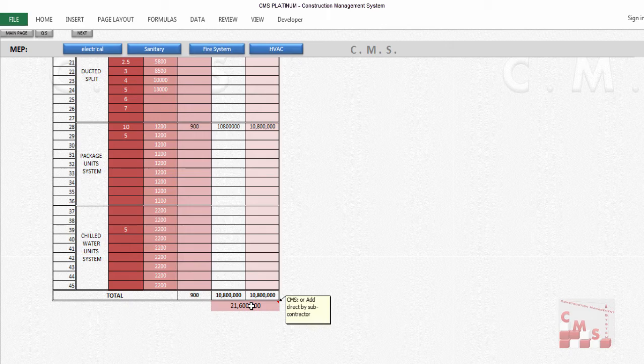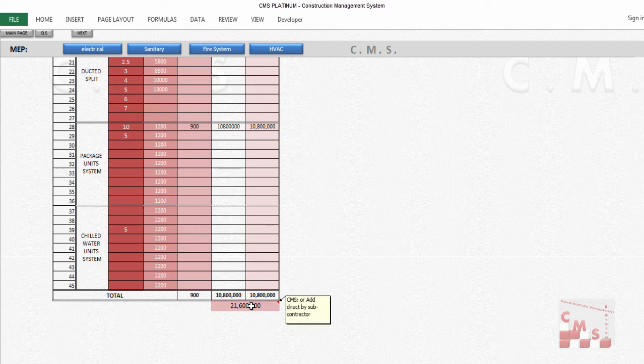You will receive quotations and actually you'll be surprised with the big gap between each other. So when you're doing this estimation and get an approximate figure by CMS, you can identify, evaluate, and judge what is the proper price you received already from your subcontractors.